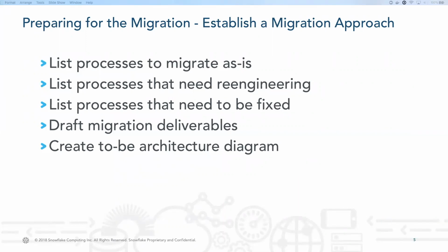In order to provide value for the business as soon as possible, avoid a single big bang deliverable as the migration approach, and instead break the migration down into incremental deliverables that enable your organization to start making the transition to Snowflake more quickly.